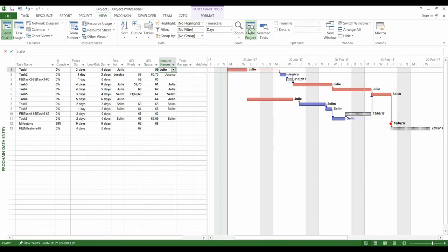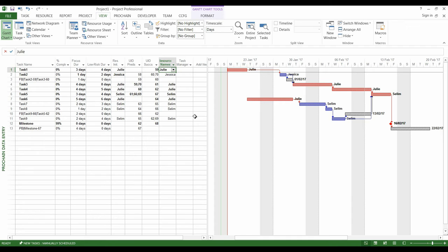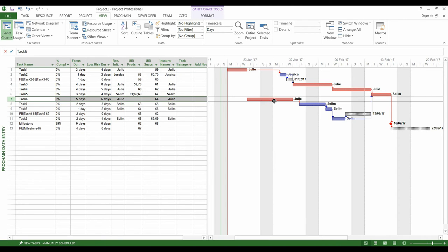Remember, Critical Chain differs from Critical Path, since the task durations are focused durations with no such thing as a margin, and because it takes into account the resources which are leveled. And look, we can see in our example that the Critical Chain, in red, encompasses the task number 6, so this task number 6 is part of the second sequence of tasks.